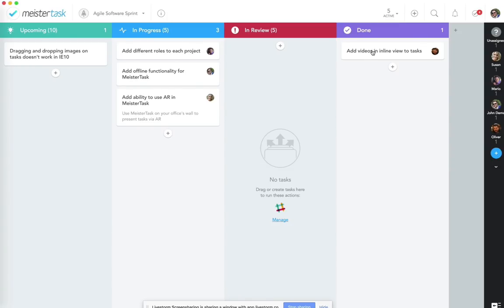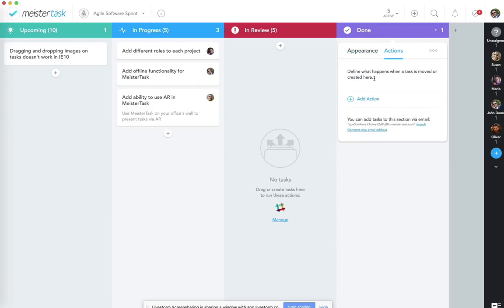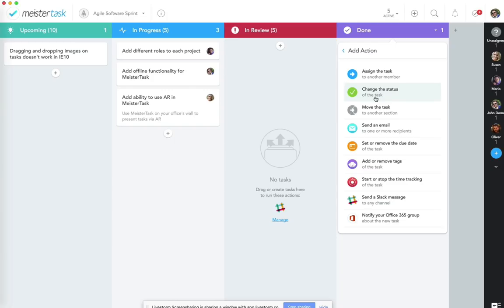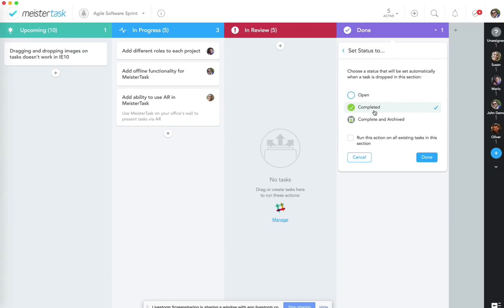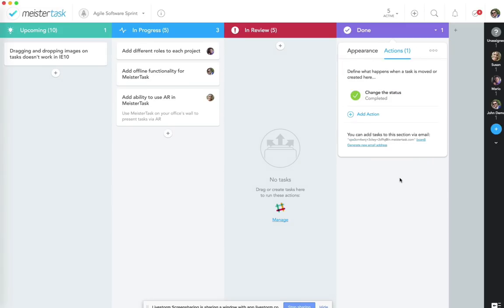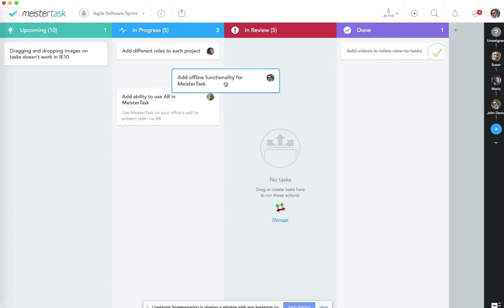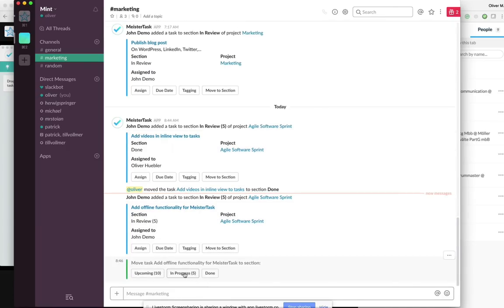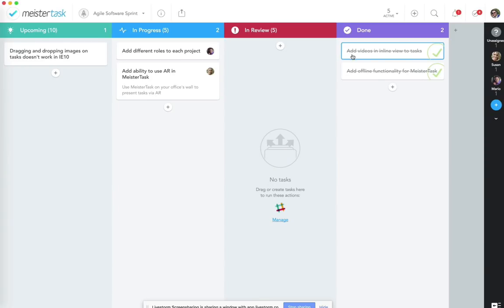Switching back to MeisterTask, the task has already moved to the Done lane automatically. For the Done section, we add another action: automatically change the task status to complete. Clicking 'Run on all existing tasks' instantly checks off all tasks in Done. This is blazingly fast — two section actions now support our sprint: a Slack notification to marketing and automatic task completion.